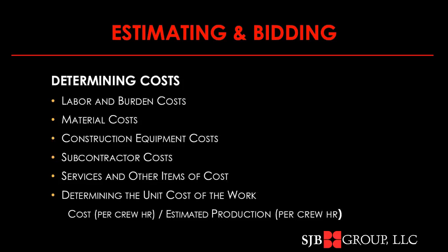For material costs, we're looking at unit prices versus lump sum. We need to make sure that we include all of our sales tax, our delivery costs, the cost for any required warranties, the cost for patent rights, the cost for storage, those types of things.